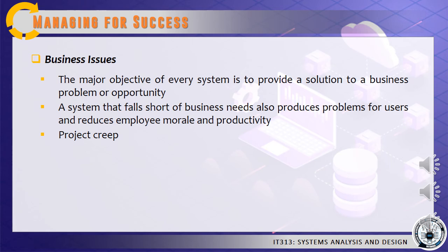Projects without clear scope definitions are risky because they tend to expand gradually without specific authorization, in a process called project creep. However, even when a project is clearly described, it must be managed constantly.